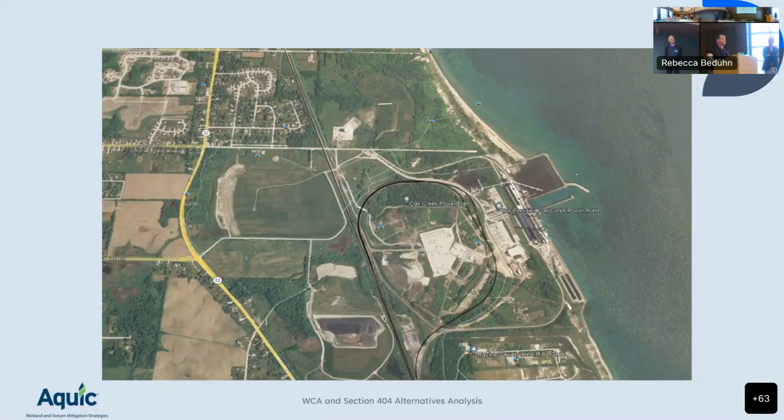They wanted to add additional generating units. So when I came into the project, they had already done their work with the Public Utilities Commission in Wisconsin and received an approval. And they dropped their alternatives analysis on us and said, here you go, run with it. Well, it wasn't bad, but it didn't answer the questions that we need to answer for the program. So we went through a 6 to 12 month process of defining the story or telling the story. And they just couldn't figure out how to tell the story. And I'll give a few examples.